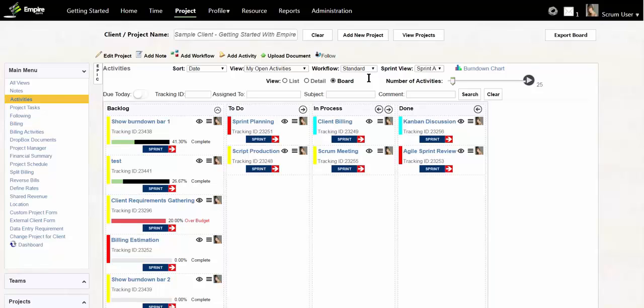On the Scrum Board, the team moves items from the product backlog to the sprint backlog, which is a list of items they will build. A Scrum sprint is a regular, repeatable work cycle in Scrum methodology during which work is completed and made ready for review. Each sprint has a start and end date, priority, and status.